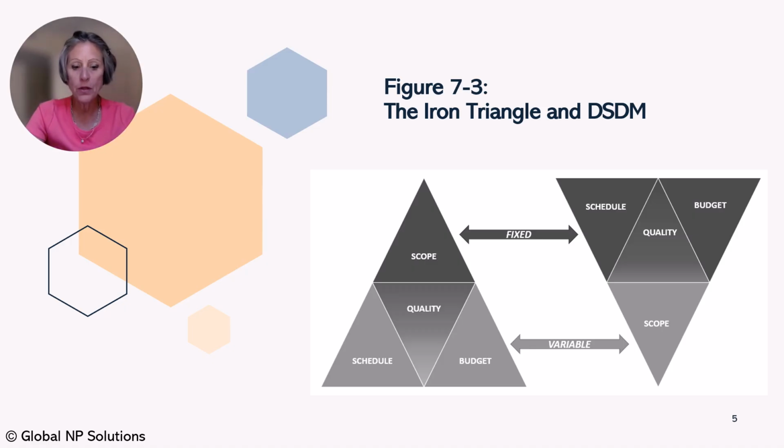DSDM products and projects follow an iterative phased approach as follows. Pre-project. Work only on the right projects at the right time. Feasibility. Verify that the project is technically feasible and cost-effective. Foundations. Establishes business rationale and how product development and deployment will be managed. Project detail is intentionally kept at a minimum. The foundations phase is revisited if elements of deployment require significant change.